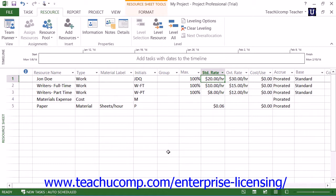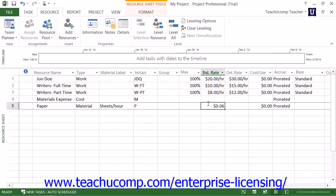You can enter the default costing information of a resource directly into the resource sheet view of a project file. For work type resources that are also people resources, you can enter their default pay rates into the standard rate and overtime rate fields in the resource sheet view in Microsoft Project. For material resources, you can enter a rate based on use or consumption of the material resource.